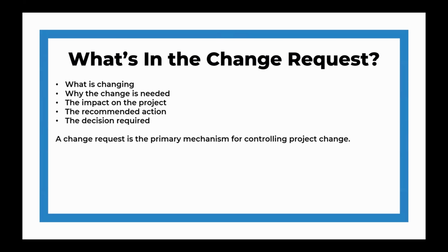So what's in a change request? A change request should describe what is changing, why the change is needed, the impact on the project, the recommended actions, and the decisions required to actually make the change. It's the primary mechanism for controlling project change.